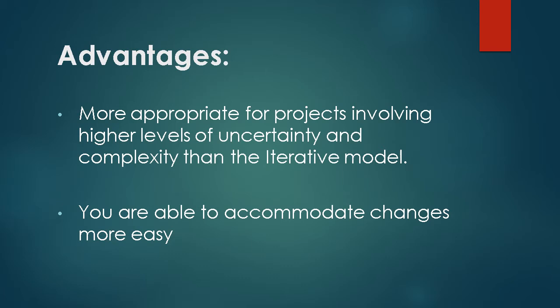The advantage of the adaptive lifecycle model is that adaptive models are more appropriate for projects involving a higher level of uncertainty and complexity than the iterative models. In that sense, they fill a void between the iterative and extreme models. Adaptive models are more useful than iterative models in those situations where very little is known about the solution. Keep in mind that solution discovery is still the focus of these models.